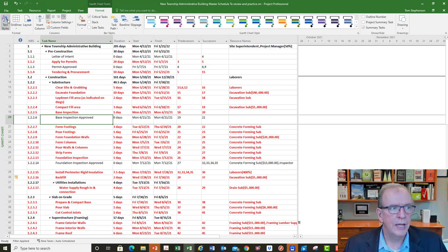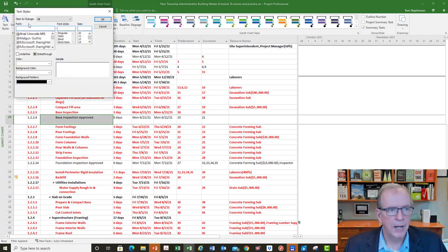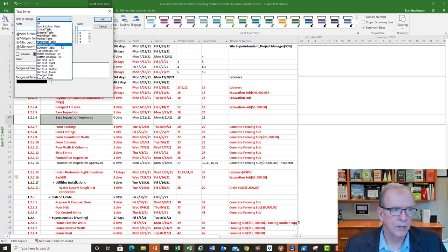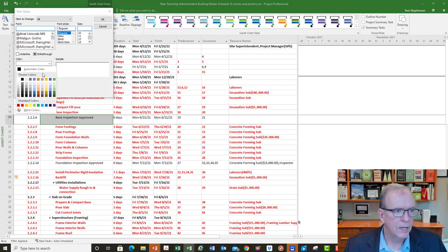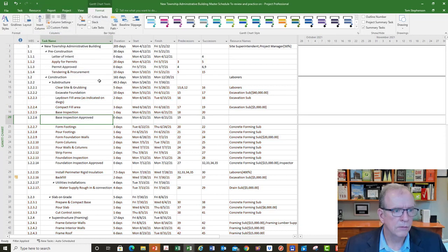When there's 0 days, they are a milestone date. And if I wanted to, I could always make them red too. I could go to milestones and make them red if I wanted to as well. So I'm just going to go back to all, and I'm going to click on bold. I'm going to click on regular, and I'm going to say automatic color. That'll give me the black, and I'll go OK. And I'm back to normal here.